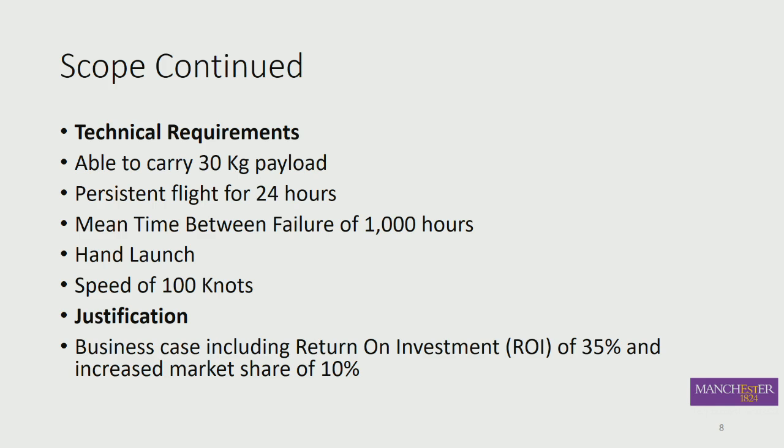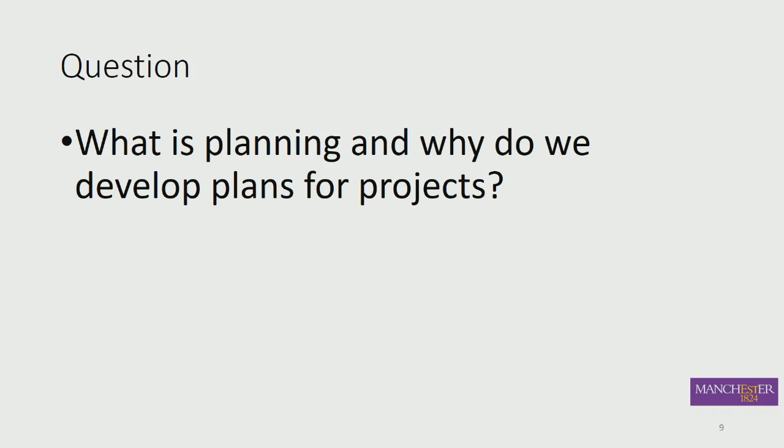And we have a continuing justification for our project, the business case. You've probably seen in the news that, especially for UK government, the detailed business case is reviewed regularly, every so often. If it's a long project, it could be annually or at major decision points, major freeze gates or review points, to make sure that the project is still viable. You know, we're spending money on this, therefore we want the benefits of the project. We want some sort of tangible and intangible benefits. The obvious one is profit, saving cost, for instance, but there are also the intangible benefits as well, depending on which stakeholder perspective you're coming from.